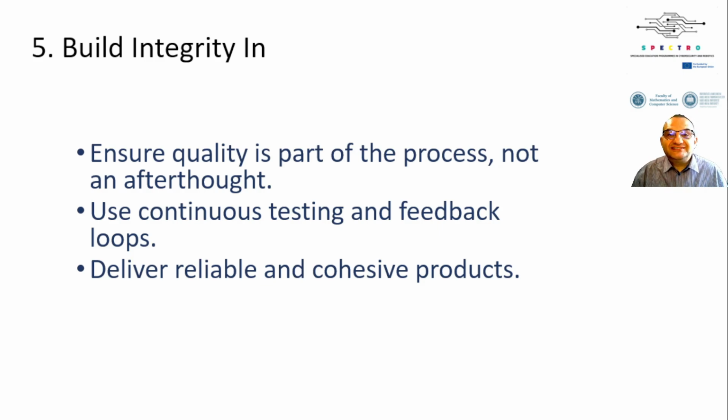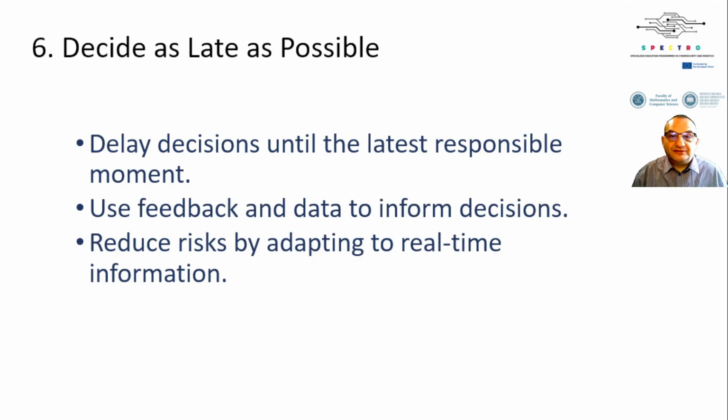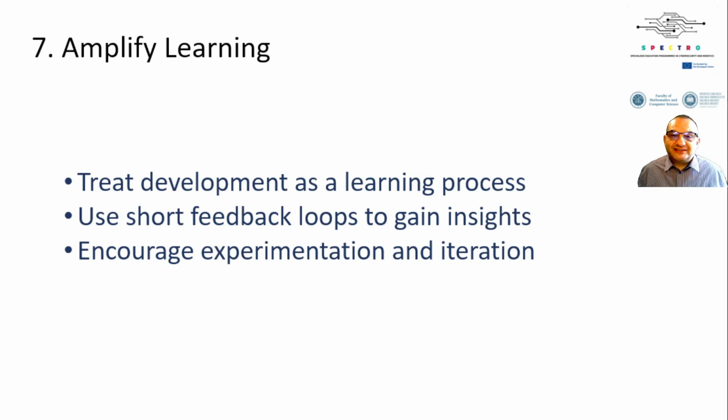The principle decide as late as possible encourages delaying decisions until you have the maximum amount of information available. This approach reduces risk by ensuring decisions are based on real-time feedback and data, rather than assumptions made too early in the process. And finally, amplify learning is the last principle.